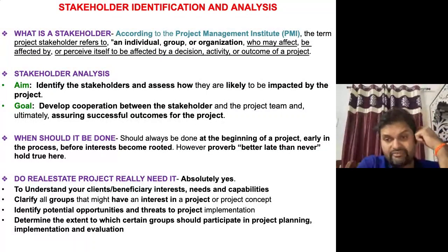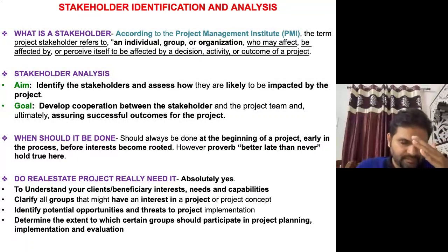Now let's move to the technical part. Now, how will the stakeholders be identified? The answer is by brainstorming. Brainstorming means you discuss with your team who may be the probable people who may get influenced or affected by my project. I can easily identify them by brainstorming. If I'm going to see any site, as a representative of that site, a project manager or an engineer, you can definitely find out who the stakeholders of this particular project are. You can list them down by brainstorming.